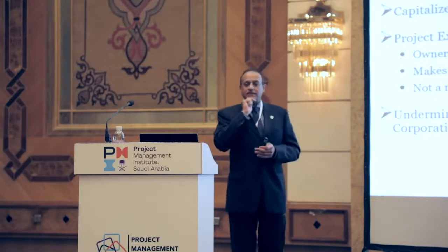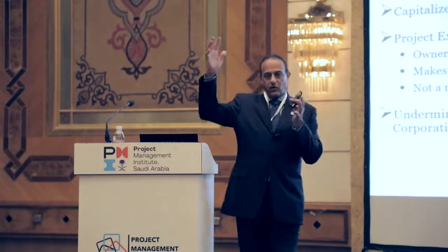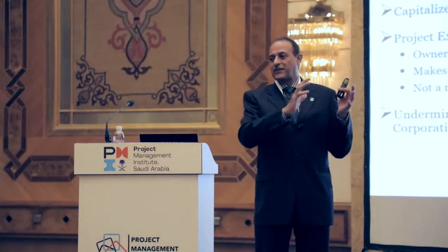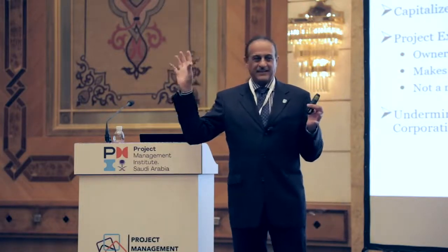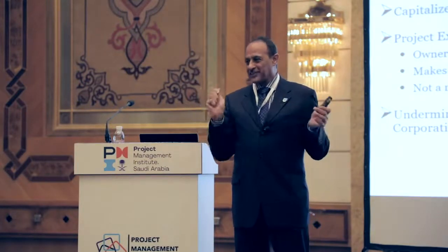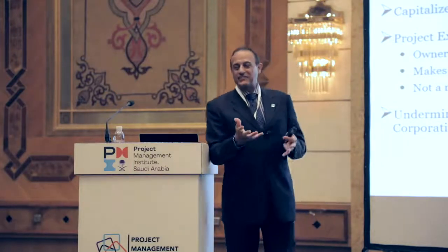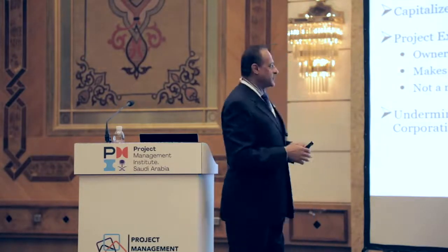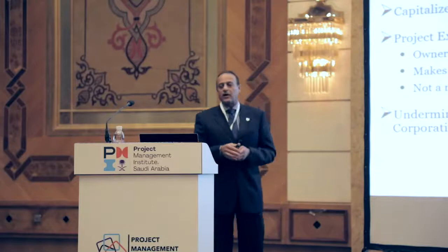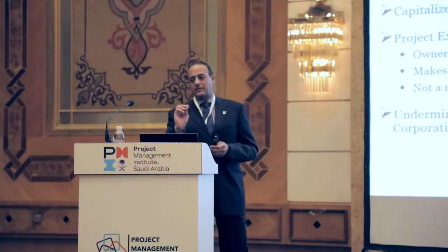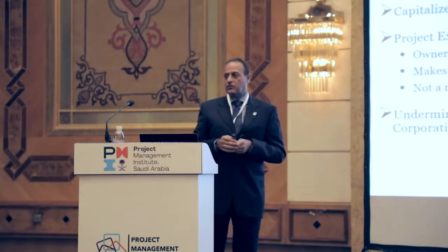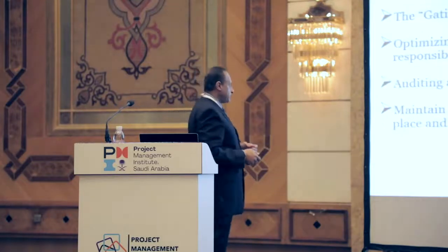What we also learned is that there is a decision maker who is the corporate, right? It is a good idea that the executive sponsor is not a member of the corporate team, because he will be wearing a decision-maker hat and a project executive hat. That will not help the team get leverage from the decision maker. He might bypass the decision maker. Do not undermine the project target setting process. It is a very important process. It will help the corporate reach world-class performance relative to the industry.